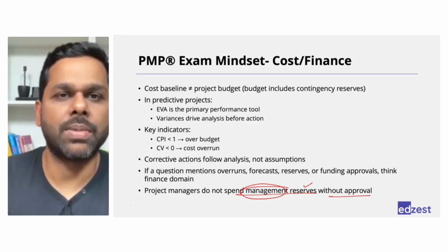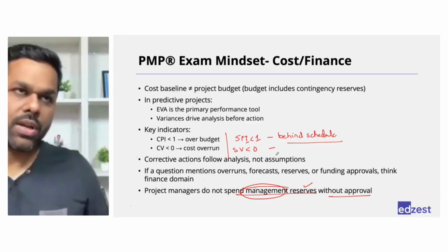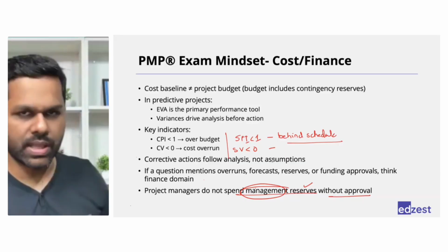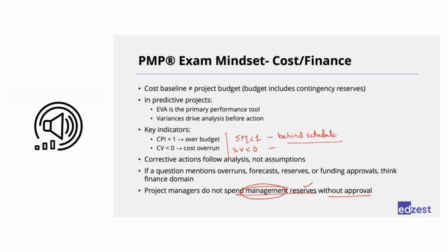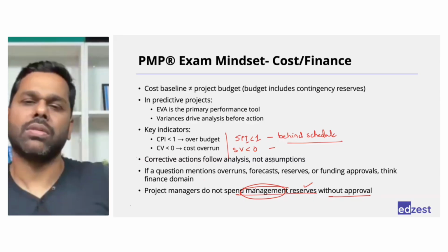Yes, Sonam, your question, please. Yes, Amit, like you mentioned, analyze, and then discuss and then take the decision. So if there is a concern related to cost, will that also be discussed within the team? Yes, first we'll discuss within the team, because the team is technically doing things. They understand it well, so we'll take their inputs and discuss with them. Together, we will decide. And then if it needs a change to the plan, we'll go for a change request and get approval. If we decided something which does not need a change to the plan, we'll just carry out the work.